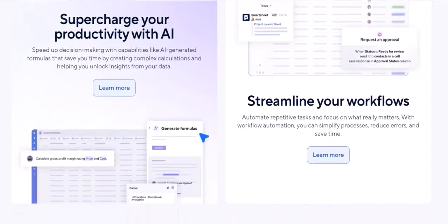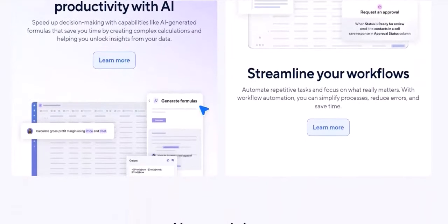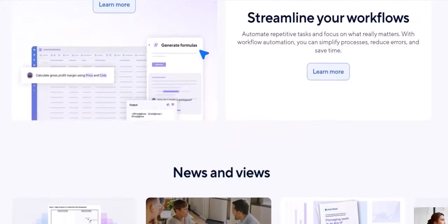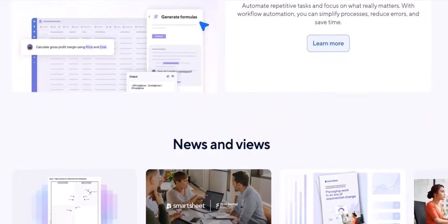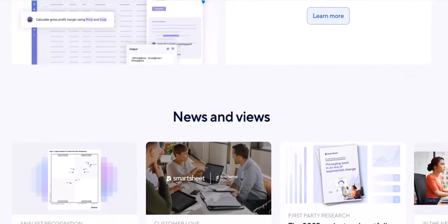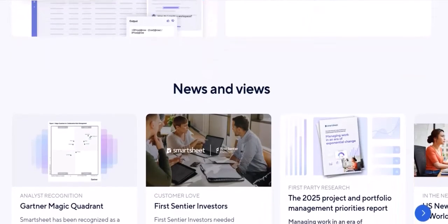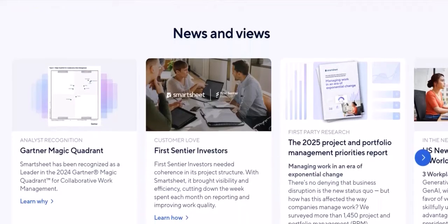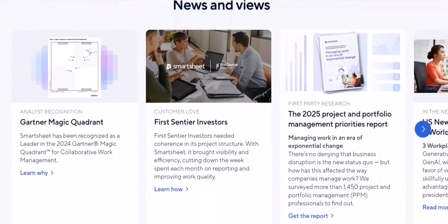Interactive drag and drop. You can directly manipulate the Gantt chart to make changes to your schedule. Need to extend a task's duration? Simply drag the end of its taskbar. Need to move a task to a different week? Drag the entire bar to the new dates. The sheet data automatically updates to reflect these changes.